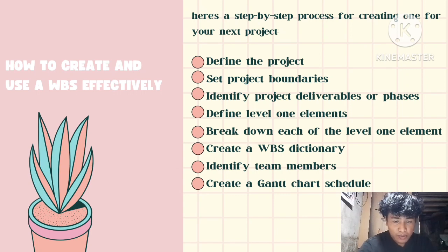Create a WBS dictionary. Develop a document that provides a detailed description of each WBS element, including its purpose, scope, responsible parties, and any relevant notes or considerations.